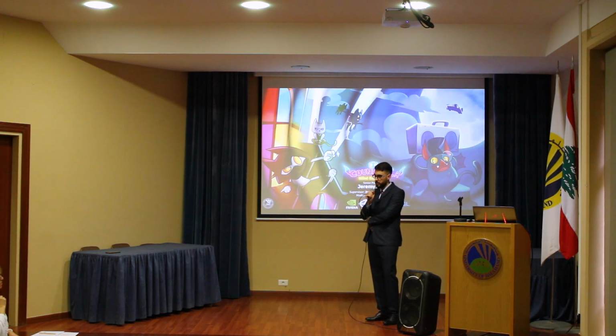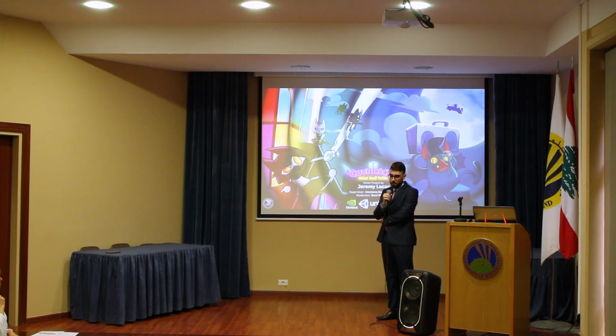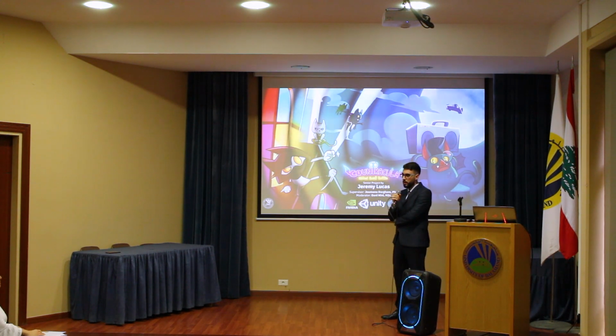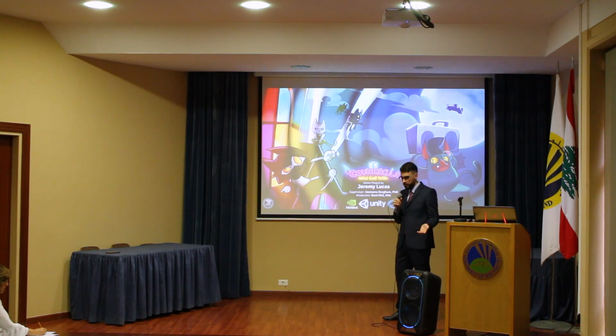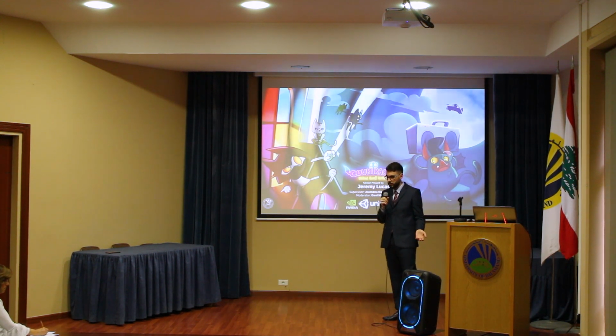Oh, that I worked on. Okay, so yes. Now I would say 10% thinking about how the game works, designing the game itself. Then I would say another 10 to 15% allocated towards studying digital signal processing and how the music works and its equivalent in coding. And then a good 35%, I guess, 40% of coding, and I would say even 50% if in the coding I include the fine-tuning part to make the game entertaining and modifying the values.